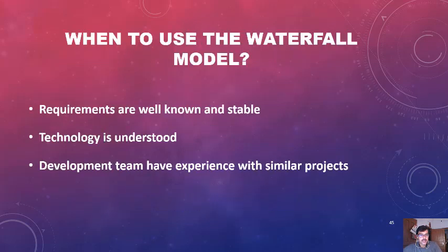When to use the waterfall model? When requirements are well known and stable. If the developer understands that all the requirements are well known and stable, and no one can change these requirements, then we will use the waterfall model. But in real life, it is not possible.